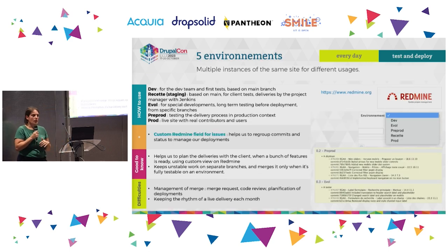We are also working with Redmine as a project management tool, and we have created a custom field in order to have the same list of environments and to be able to create a specific list of issues, showing which features are available on which environments, and to make specific tickets for deliveries. I will explain just right after.